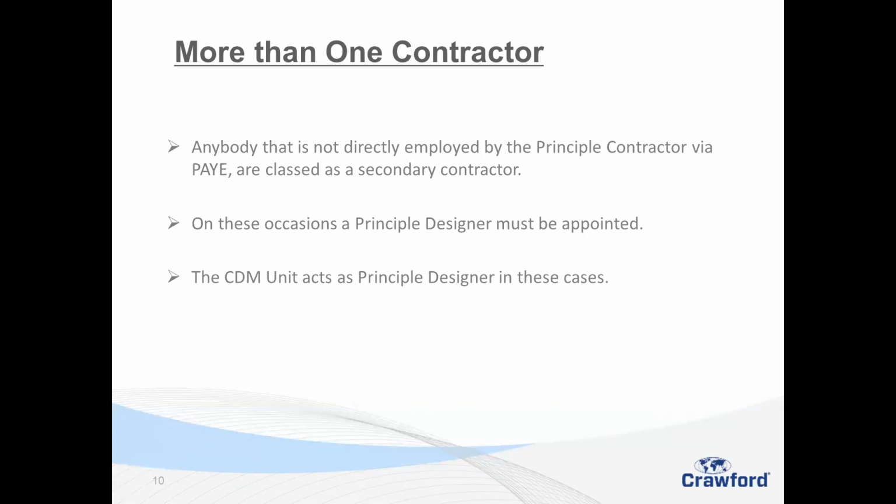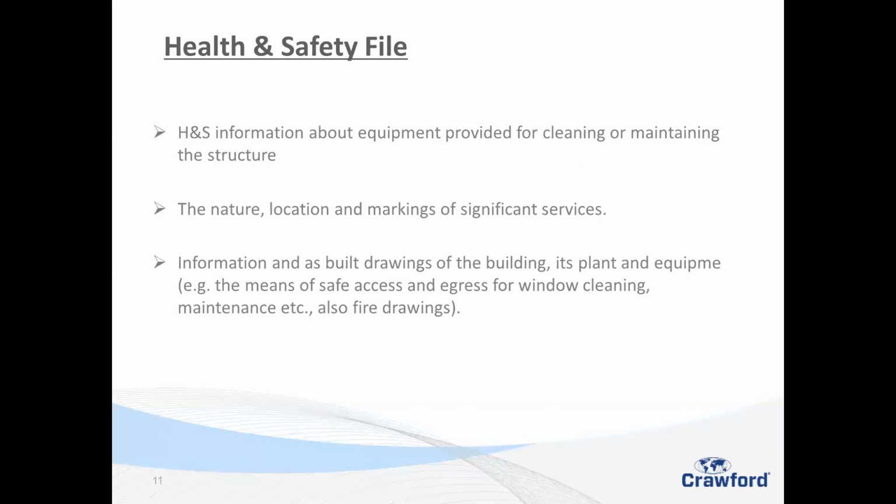Unfortunately, you are then exceeding the single contractor level, and you have to bring in a principal designer, and they must be appointed by the client in writing. Our CDM unit, who, well, I'm the manager of, we actually act as principal designer in many of the cases, unless they're very, very simple, and the contractor that's actually conducting it uses all his own staff, and they're all on the books as such, paying their tax by PAYE.